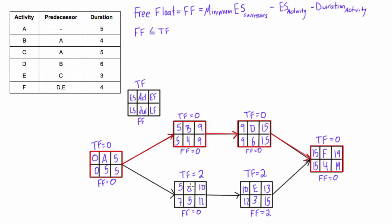Now look at activity C — if we delay it by even one day, it starts on day 6 and finishes on day 11. Bringing 11 over to activity E means its early start has been pushed from 10 to 11, so we've affected the earliest start of a succeeding activity. There's no amount of time we can delay activity C without affecting a successor's early start, so its free float is zero. Free float may be of questionable practical use, but it will likely be asked on a test, so that's how you calculate it.